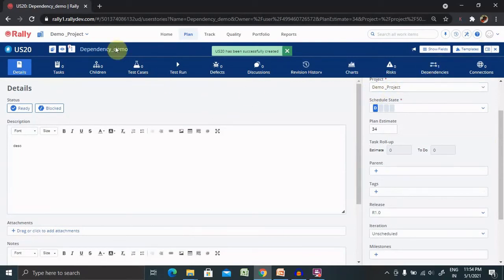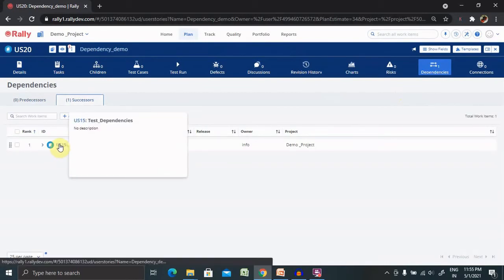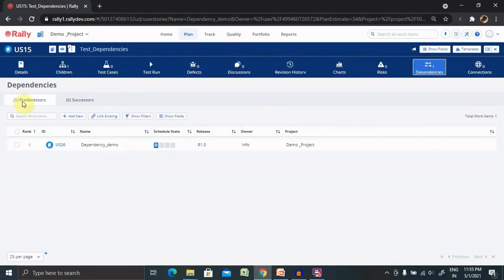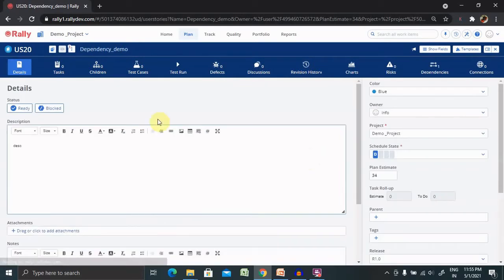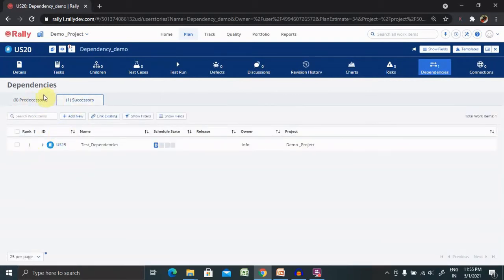You can see one dependency is available inside the dependency demo user story. When I jump to the dependencies user story, I can see the successor is available here because I added the test dependency. When I select the dependency tab it shows me the predecessor. This means this story is dependent on the other user story, and they are relational to each other — unless this user story is complete, we cannot say the other is completed. This is how we create dependencies at the user story level.